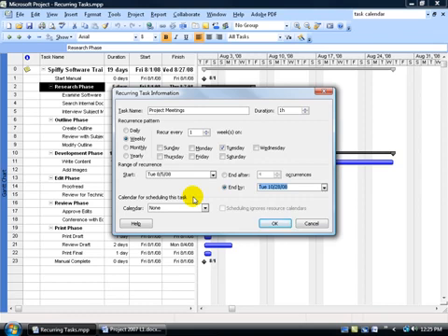Now remember, we created our project calendar. By default, you see where it's set to none? If we do nothing more but just click OK, this task here will go along with the project's calendar. So in other words, we have Christmas off. If the meetings go over Christmas or try to go through the week of Christmas that we have off, it'll go ahead and bump them out so it doesn't occur during the week or days that we have off.